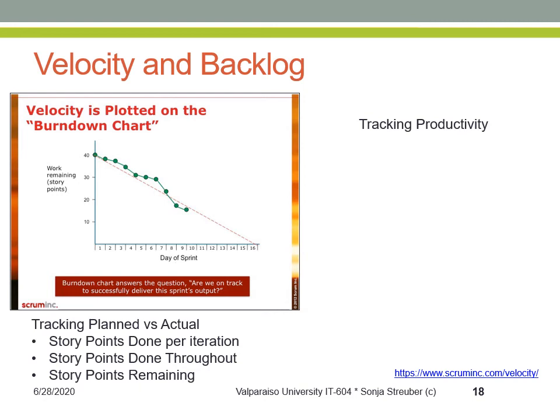These are the green dots on the green line. The completed points are the difference between the previous and the current green dot, and the slope gives us the trend, indicating whether we will be able to meet our commitments for the sprint or not.